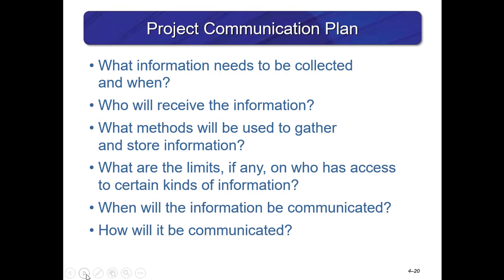The project communication plan is usually a required element. It provides a plan for how information will be collected and when, who will receive it, which stakeholders get what, what methods will be used to gather and store information, limits on access to information, when communicated and how communicated.